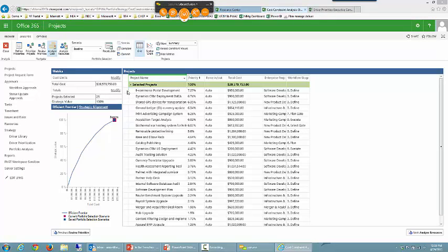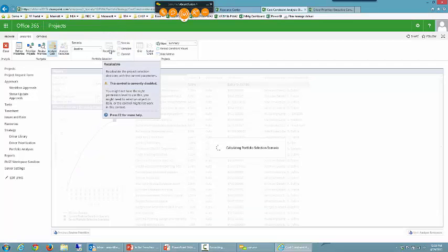This was kind of like a pie in the sky analysis, but I don't really have $20 million to do all these projects. What I can do is drop my total cost here, or whatever field I use. I'm going to drop it down to 15 million, and just so I don't have to type a bunch of zeros, I won't make it even 15 million, but 15.5, pretty close. When you put a new value in here, you can hit recalculate, and you can play around with the what if analysis.